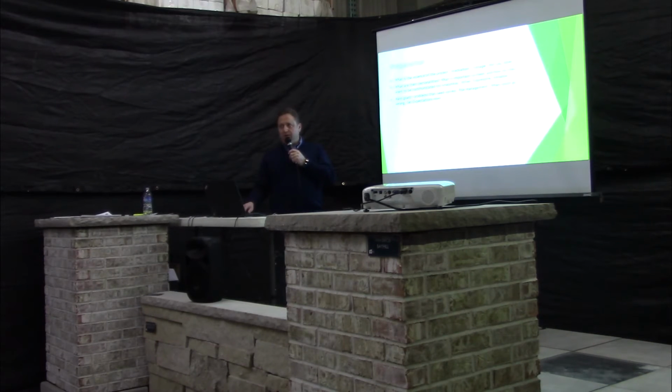Know the products you're using, know the installation. I had a customer at one time who asked me to put a fish tank over their bar, 4 feet wide, by 6 feet wide, by 2 feet tall, and it was going to hang from the ceiling over the bar. And I told him absolutely no. You're going to have to engineer all your trusses. You're going to have to put in footings. Not only that, if it does break, you got a huge mess on your hands. And I'm not going to be responsible for that.